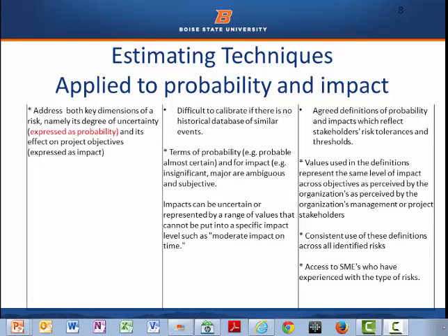The first one is pretty much a scientific type tool. It's similar to the probability and impact matrix we use, but what's happening is on the one matrix, probability is expressed as a probability, not as a range. In many cases, this is a software program, and it gives you more detailed area. It's again used for high value areas of software manufacturing, but not commonly used in most business cases, as the P&I matrix does a pretty good job in this area.